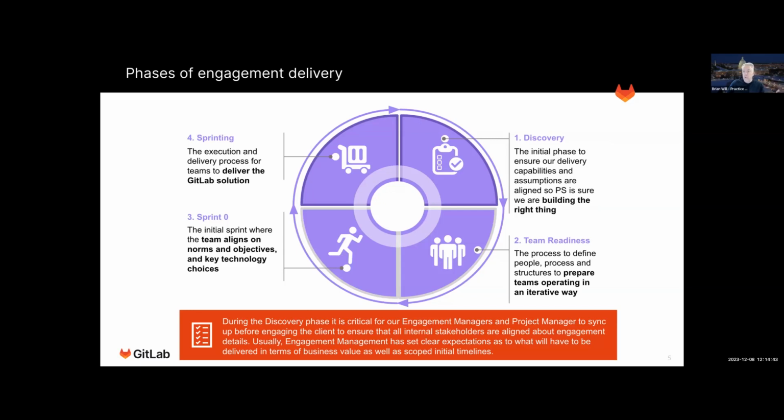you basically start with what's commonly referred to as sprint zero, where you pull everybody together and make sure you have the right staff, you understand the requirements, you have the systems to develop on, you have system access to networks, you open the right ports on your router, and all kinds of other things in place. In the physical world, that might require you to have an office at the customer. In the virtual world, you might have to agree on whether you're going to use Zoom or Teams or some other team collaboration software. And once all that is agreed upon in sprint zero, you then start sprinting and start working on the deliverables. So pretty standard process, nothing really exciting here.